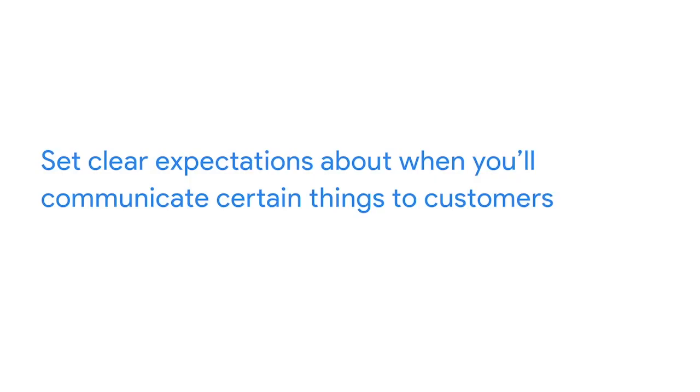High-performing project managers set clear expectations about when they'll communicate certain things to their customers. For example, you might want to set an expectation that you'll provide weekly progress updates to keep clients informed, rather than expecting them to come to you with questions. When troubleshooting an issue that won't affect the outcome — like replacing a designer quickly without skipping a beat — you can complete the task at hand without giving the customer any additional worry. You'll have to use your judgment regarding what's important to communicate to your client.